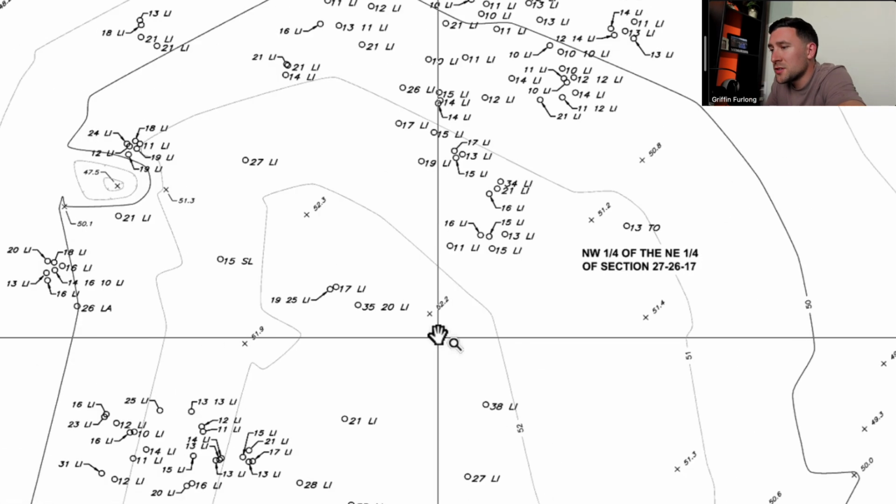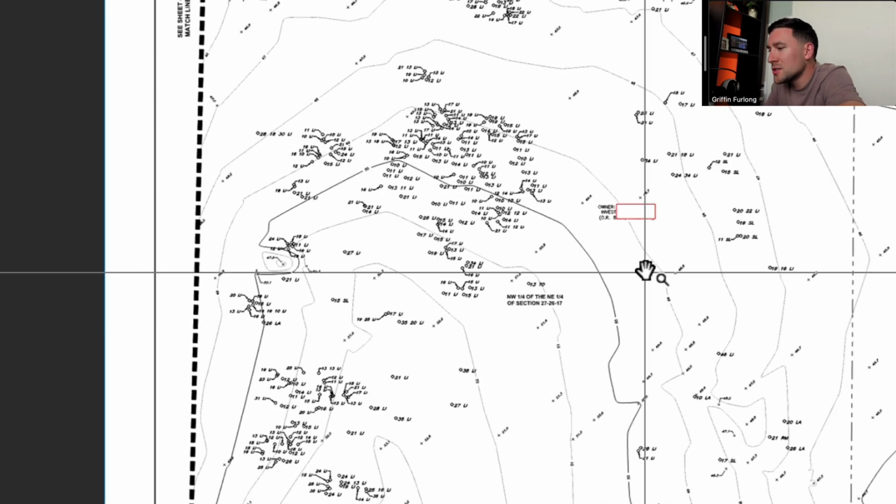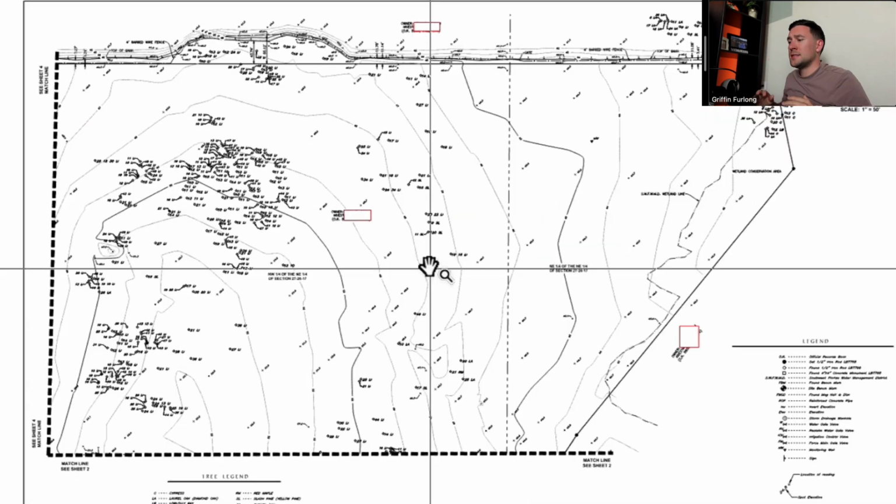survey. A tree survey is really important, especially because municipalities typically will require some sort of mitigation for removing trees. And this is why we work hand in hand with the surveyor, a landscape architect, and an arborist to understand the quality of the tree.